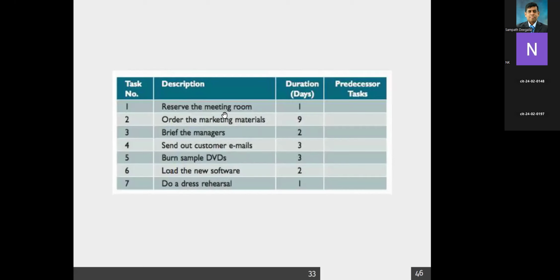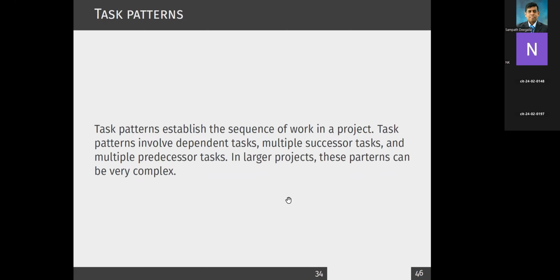Right. Now, for example, here you can notice we have identified some work breakdown structure and some durations. So we discussed how to estimate this one. You look for the best, you look for the worst, you look for the possible ones, and then you can calculate the duration. Right.